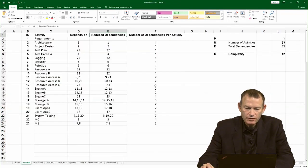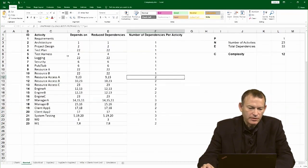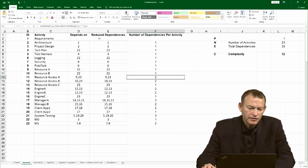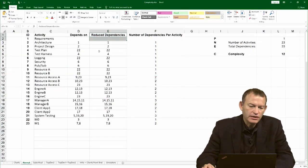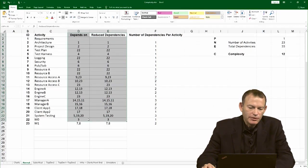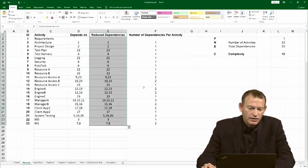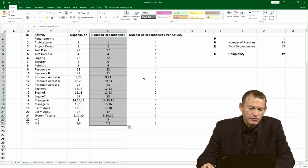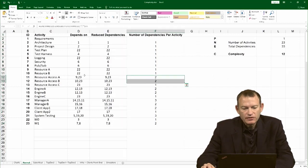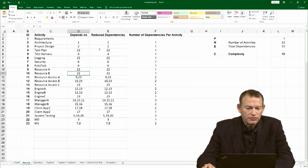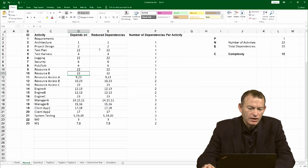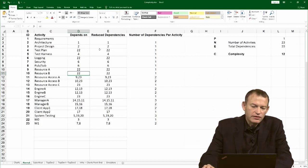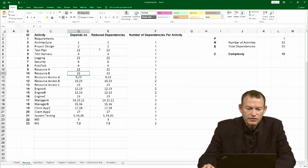I'm copying it to a separate spreadsheet over here. And the first thing I'm doing is I'm reducing the dependencies. Sometimes you're going to have superfluous dependencies that are already inherited by other dependencies, some kind of transient dependencies. Those would just increase the complexity calculation for no good reason.